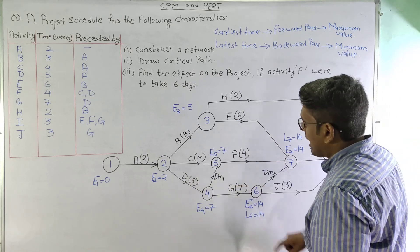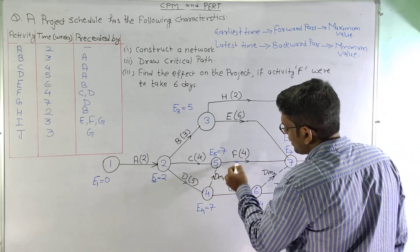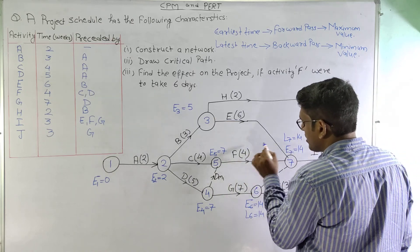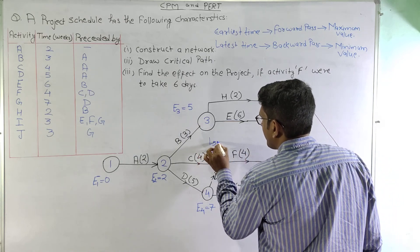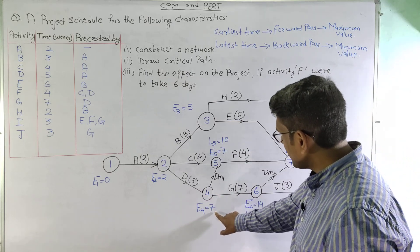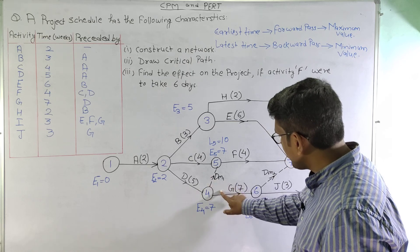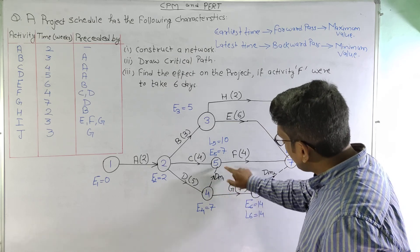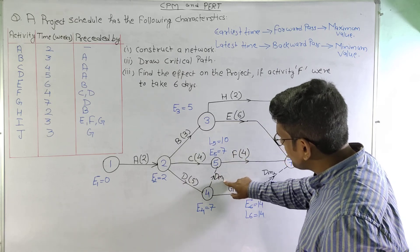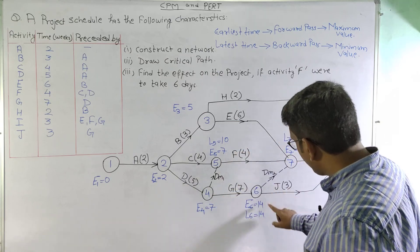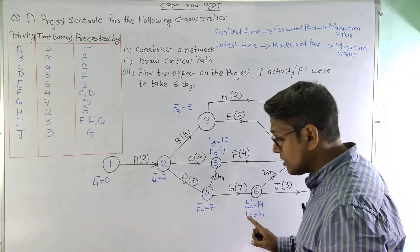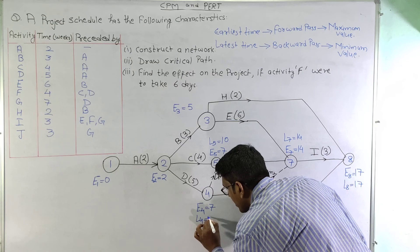At node 5, only a single outgoing arrow: 14 − 4 = 10, so L5 = 10. At node 4, two outgoing activities: from one path 10 − 0 (dummy) = 10, and from the other 14 − 7 = 7. We select the minimum, so L4 = 7.